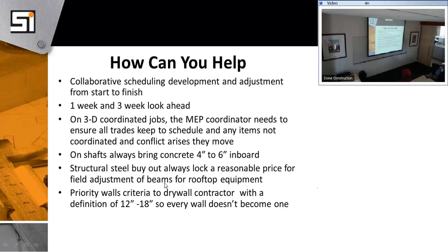This was more just one of my guys saying, it's more helping you guys. We were in a job, and they didn't address miscellaneous steel, and the steel guy was just reaming the general on all the changes for miscellaneous steel for the air handler. So negotiate what miscellaneous steel is and how much, ahead of time. Because he was just watching them rake the general.